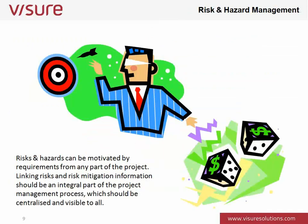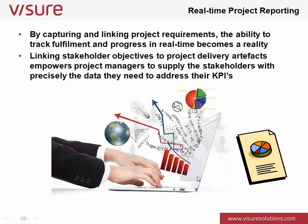We also need to think about risk and hazard management. Once you build this information into a requirements database, you can have a risk and hazard document. Risks and hazards can be motivated by requirements in any of those documents within the project. Linking risks and hazards to risk mitigation information should be an integral part of the project management process — centralized and visible to anyone who needs access to it. This is another element of traceability that can come out as a report from the database.